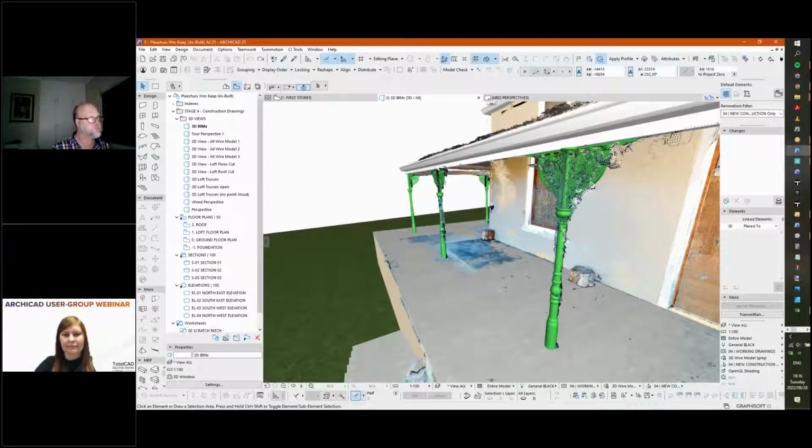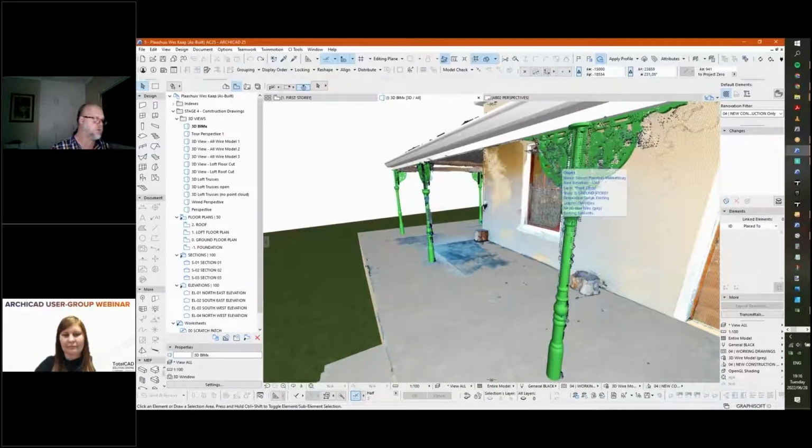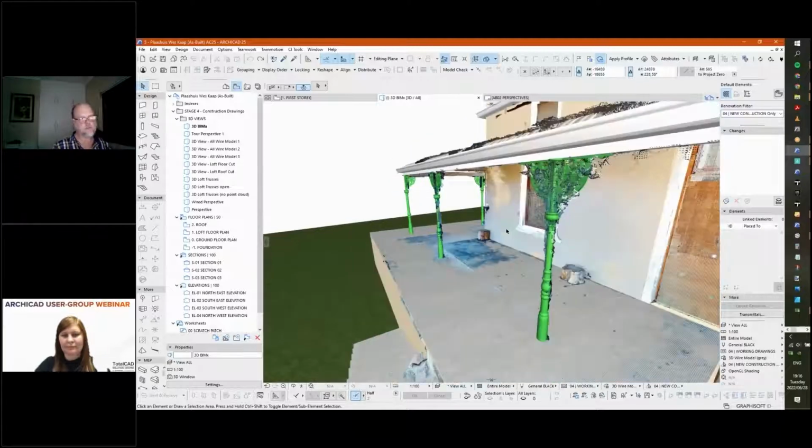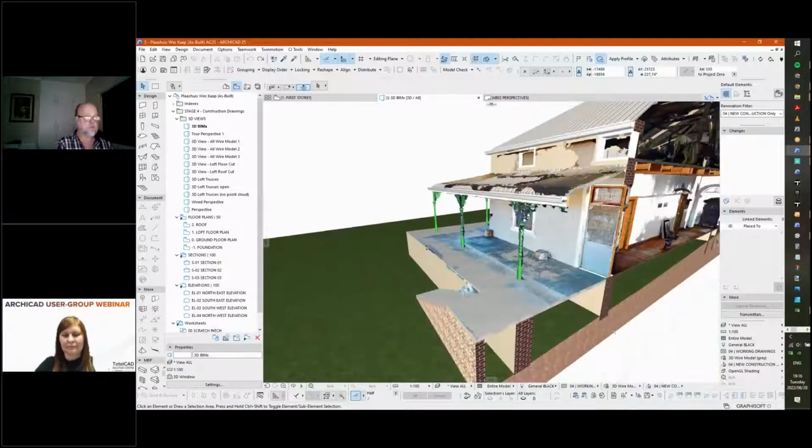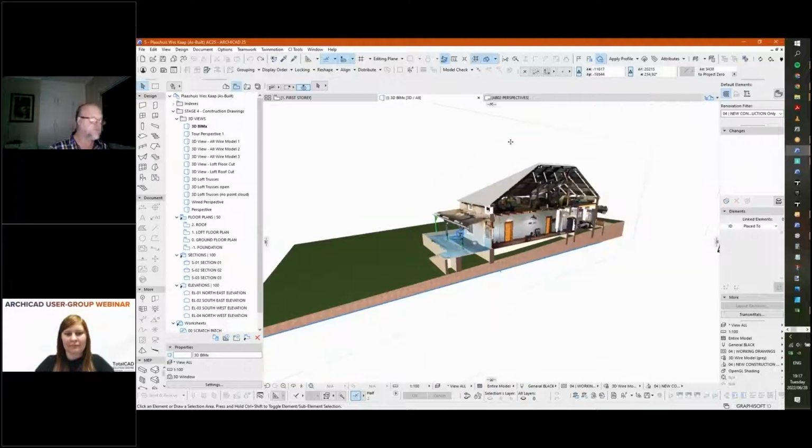All these columns can be derived and accurately produced. So that's all detail that goes into the scan and then also into the modeling side. These are factors driving the cost. If we need to scan into roof spaces where we need to capture MEP systems, then obviously that's a different, separate additional scope that will also drive cost. But this scan, you can literally see what the scan was. This was roughly 9,500. Does that give you an idea, Clara?